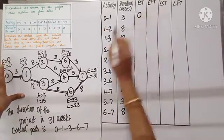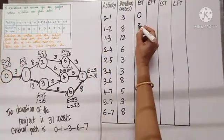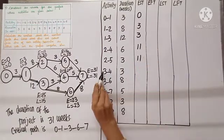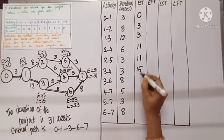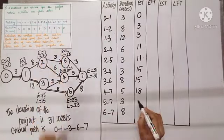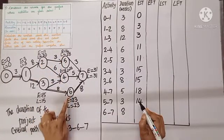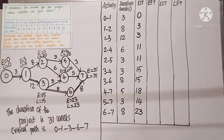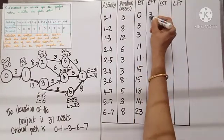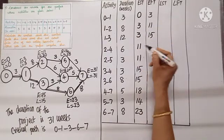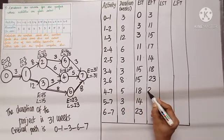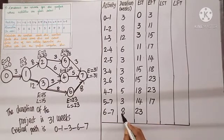EST is the E value at the starting node of each activity: zero-one starts at node zero, EST=0; one-two starts at node one, EST=3; one-three starts at node one, EST=3; two-four starts at node two, EST=11; two-five starts at node two, EST=11; three-four starts at node three, EST=15; three-six starts at node three, EST=15; four-seven starts at node four, EST=18; five-seven starts at node five, EST=14; six-seven starts at node six, EST=23. EFT is EST plus duration: 0+3=3, 3+8=11, 3+12=15, 11+6=17, 11+3=14, 15+3=18, 15+8=23, 18+5=23, 14+3=17, 23+8=31.